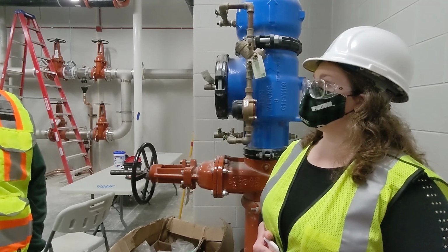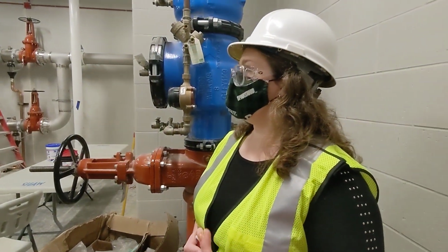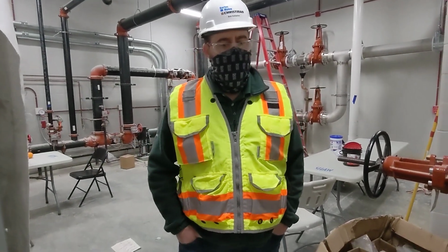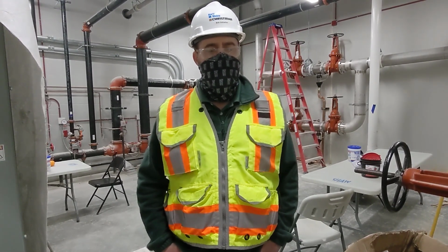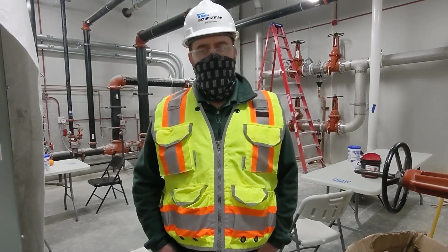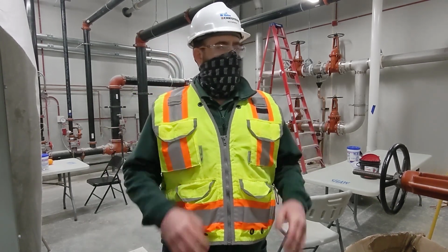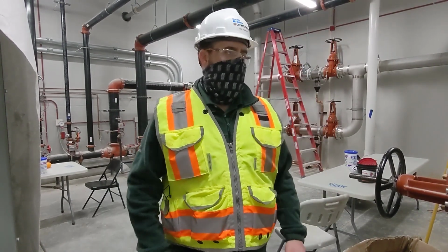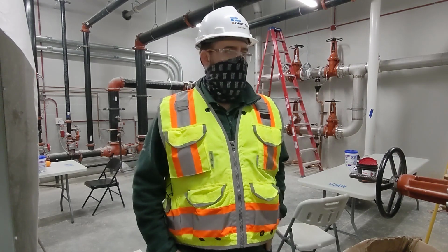Is there a specific order in which it's important to install the MEP? Like, is there a way that you install the electrical and then the plumbing, which was the preferred order? Yeah, so with the building information modeling process, the BIM process, typically the precedent is that any large ductwork or large pipe is installed first, given the lack of area to move. It's kind of a fixed thing. So the general rule of thumb is everything big is up high to the greatest extent possible, and then the more agile trades, call it the smaller conduit or fire protection lines, are always considered lower in that tier.